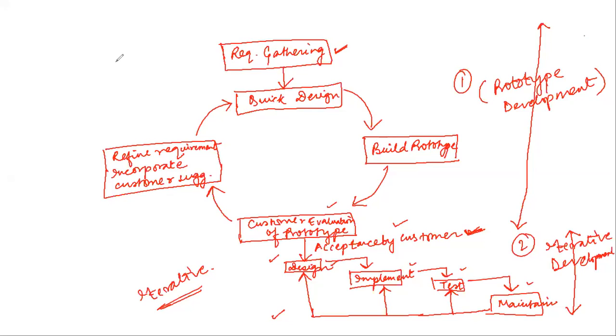By constructing the prototype and submitting it to user evaluation or customer evaluation, many customer requirements are properly defined, and also the technical issues get resolved by experimenting with the prototype. So this minimizes the change requests from the customer and the associated redesigning of the code. So those projects which suffer from technical and requirement risks, for those types of projects we generally construct a prototype, and a constructed prototype helps us in overcoming those risks.